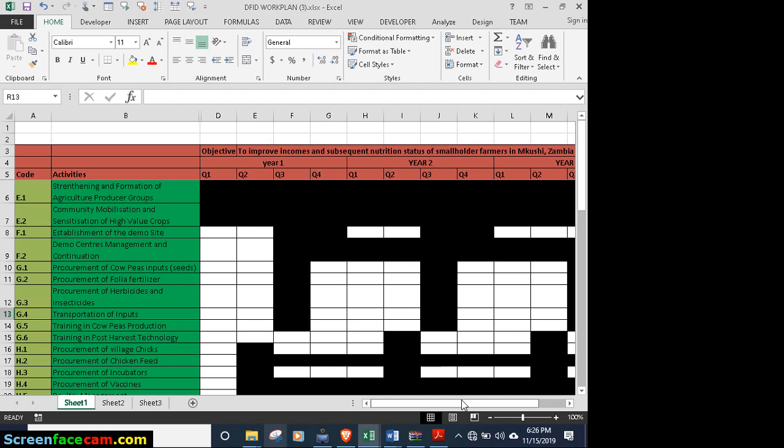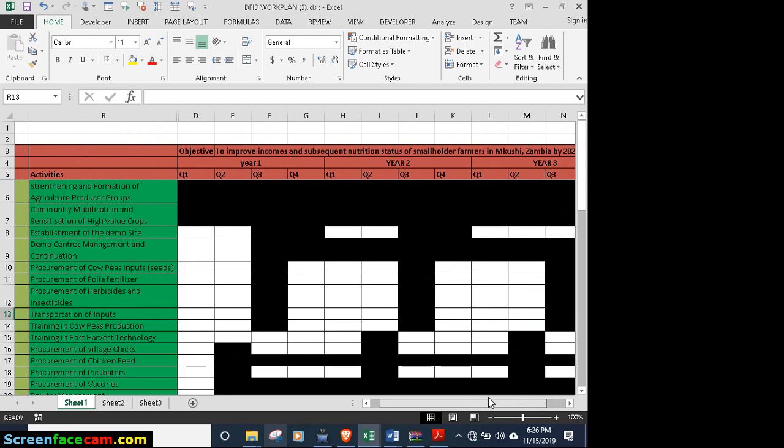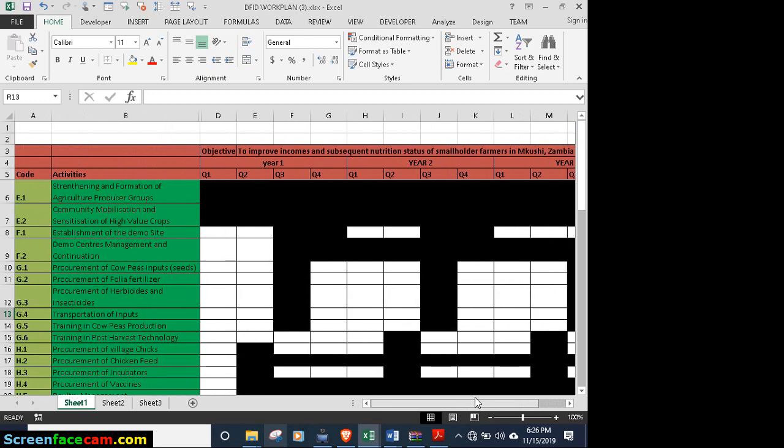Your Gantt chart, which you did with Kennedy. And you could attach maybe another column at the end, the person specific, as in who's responsible for ensuring that particular activity is conducted within the set time. If you wanted, you could even attach another column to add budget costs for each activity.